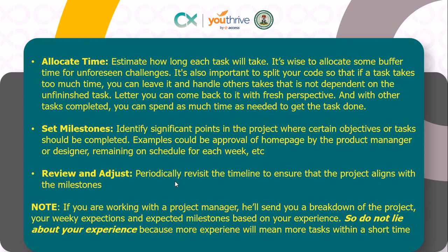So it is important to split your code so that if a task takes too much time, you can leave it and handle other tasks that are not dependent on the unfinished tasks. Later you can come back to it with a fresh perspective, and with other tasks completed, you can spend as much time as needed to get the tasks done. So please keep this in mind.